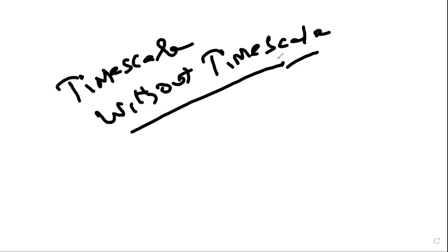Once you are giving the sequence, which activity you need to do first, which second, third, fourth, which will be done in parallel, which has to overlap, you're not giving the time. Once you put that into the sequence in a network diagram without the time scale, then only can you estimate how long it will take to complete each and every activity. So we can go in a systematic way.